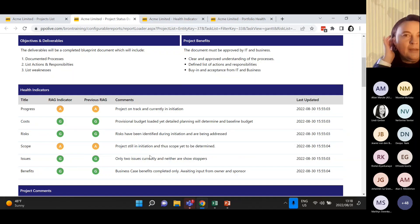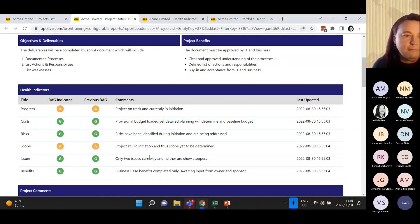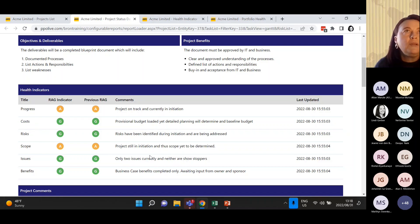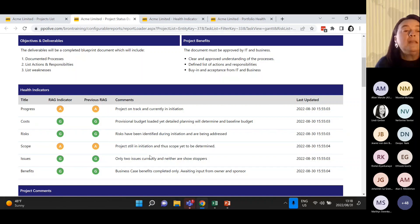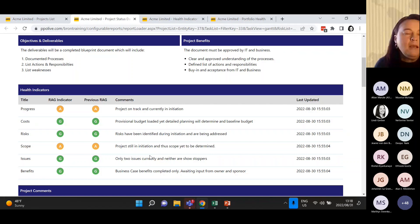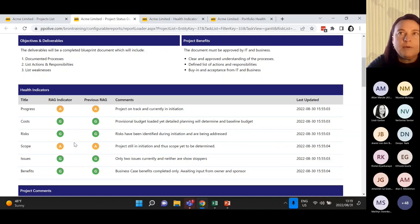It's important to keep in mind that calculated health indicators only work well in a very mature environment, where project managers are good at getting all the other data into PPO. If they're not importing their schedule regularly, not updating their risks and re-evaluating the RAGs, then when it comes to calculating those health indicators, you might not get a very accurate view on how the project is doing.